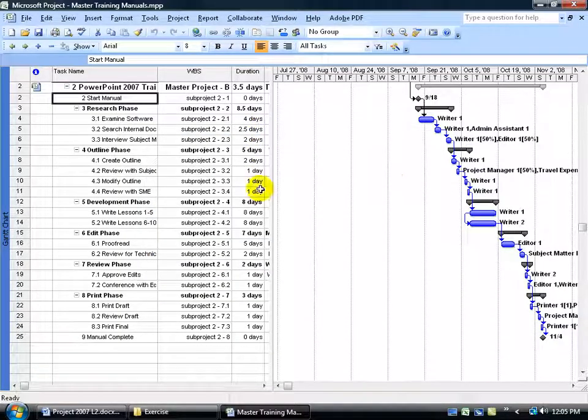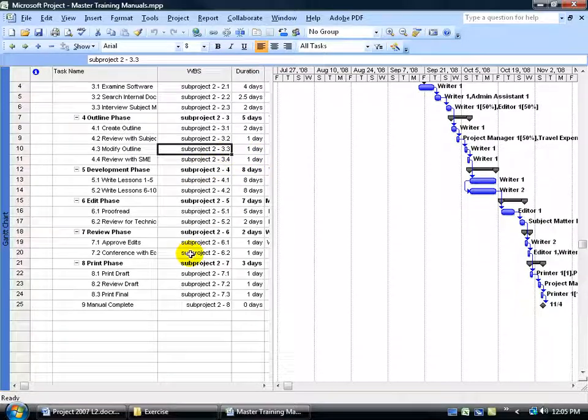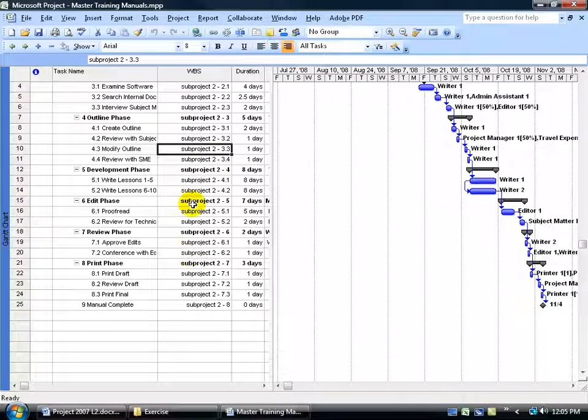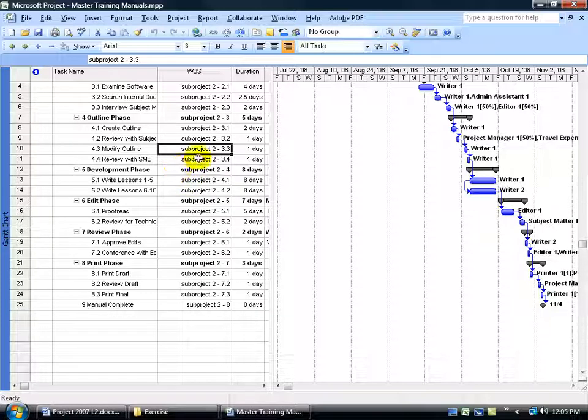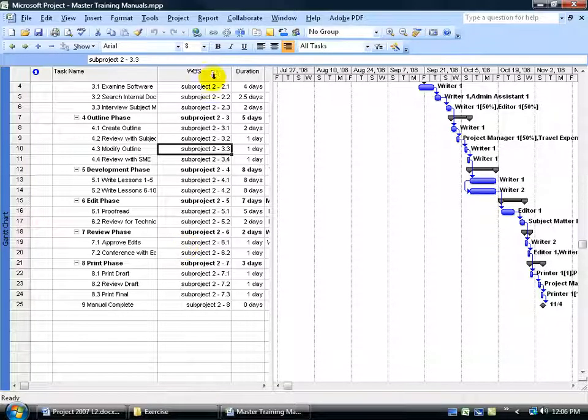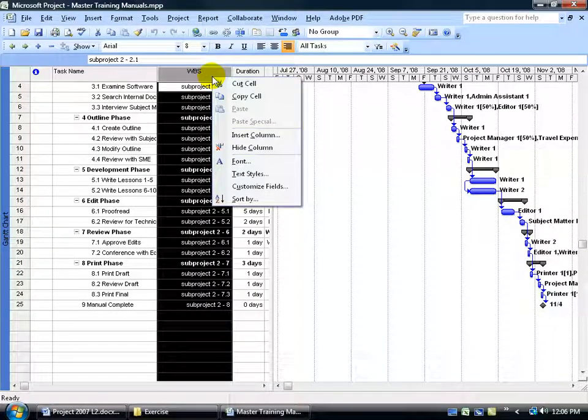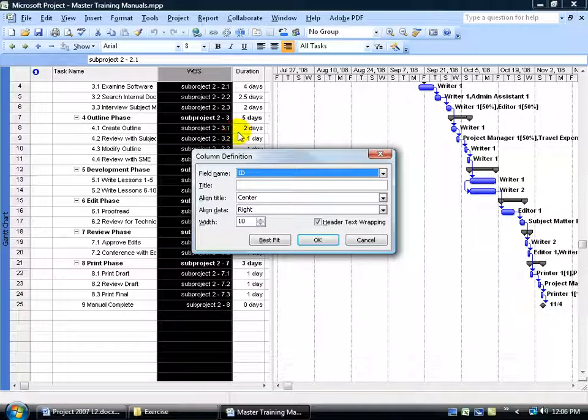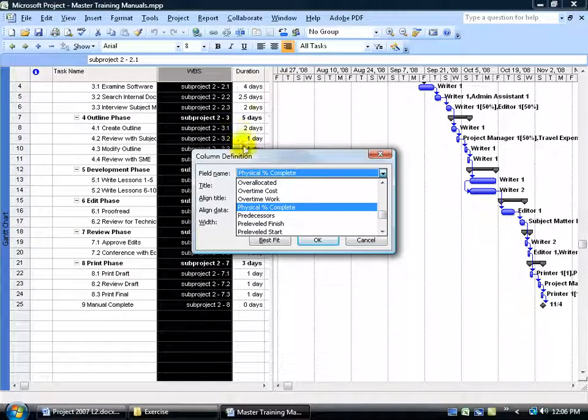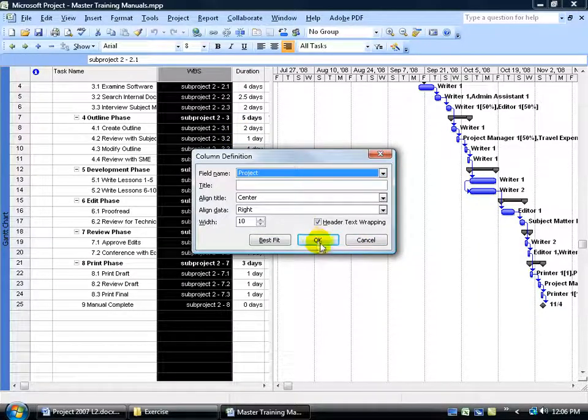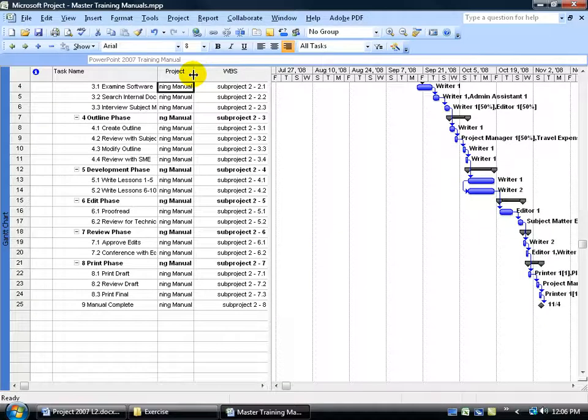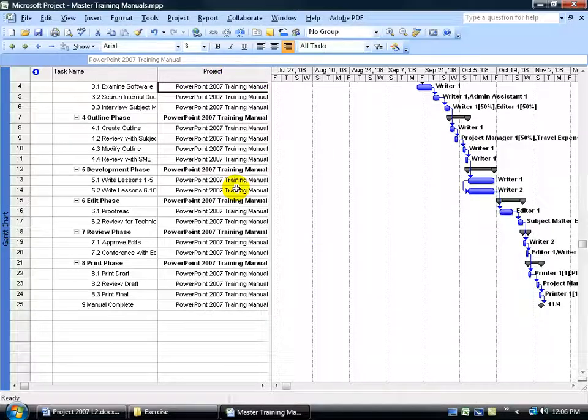Close out here. And one final thought here is that if you're having trouble when you're scrolling down through here, which project that you're in, I can't remember if I'm in project 2, like what's subproject 2? Is that like PowerPoint, Outlook, and the tasks go on and on? You can go ahead and insert the project field, and that will help you to be able to identify the tasks that belong to each subproject or what the name of the subproject is. Just come up here and right click on any of the column headers, go down to insert column, type in the letter P so we can get to the Ps, and then scroll down. There's project, select it, click OK.